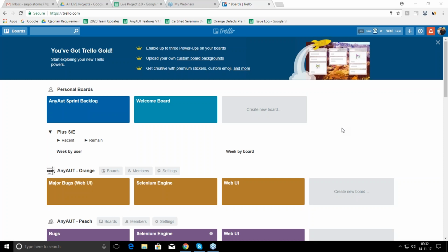Yes, absolutely. For writing the user stories and all, we can use Trello. Why aren't there any green labels on Trello, only orange? It's moved directly to ready for deployment, but doesn't that mean the testing is done by QA? So team, the testing is done. Whatever has been moved there, if it is good to go live and the testing is done, then it should go for the green label. The color is up to us. We are following this process for each phase.